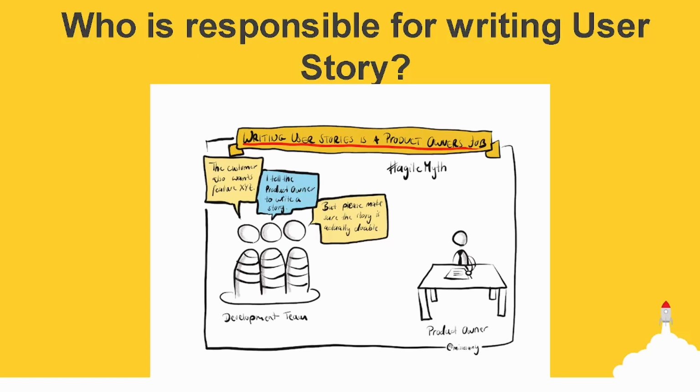So next question, who is responsible for writing user story? User stories can be written by anyone, although it is a product owner's job to ensure that an agile user story backlog exists. This does not imply that the product owner is the one who produces them.